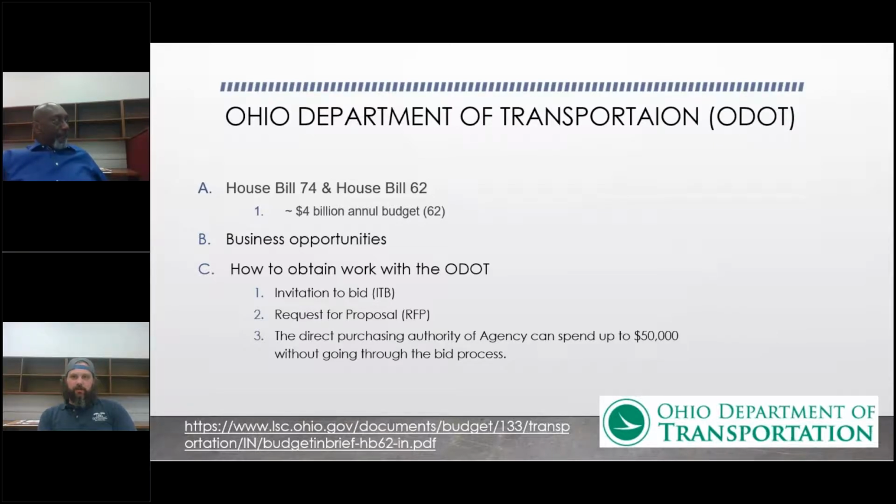So to relate back to, I'm not sure if everybody here was in on the estimating first presentation that Eric and I put on last week, but with prevailing wage work for us, I'm an open shop where not all of our projects are at prevailing wage, but when we're doing any work for government agencies or local city municipalities and whatnot, we just have to make sure we bid accordingly and make sure that our hourly billing rate is correct to cover the prevailing wage rate and all the benefits and everything associated with it. Boy, it's great to be able to present with someone that gets into the nitty-gritty of some of the theory and the laws that we're talking about.